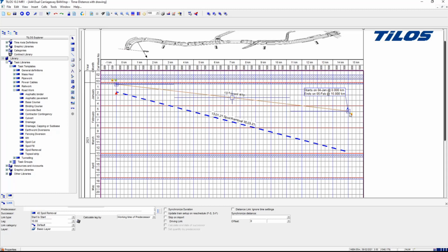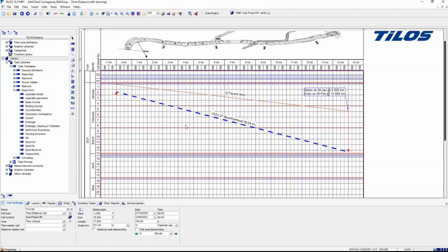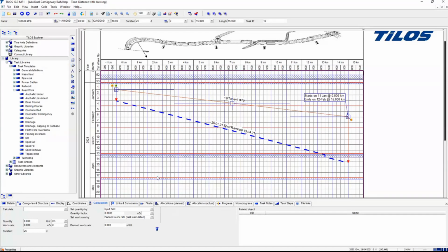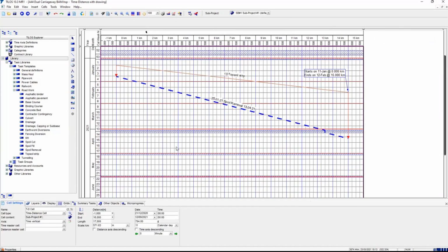We could have multiple, which is pretty essential, multiple links between two tasks. And again, we don't want the end, and obviously that's pretty redundant in this circumstance. So at any point I can reschedule, which would move things around. So if we said, well, this one, we can't start this one till a week later, then we can do a full critical path calculation and position it at another place. So it does have those abilities.